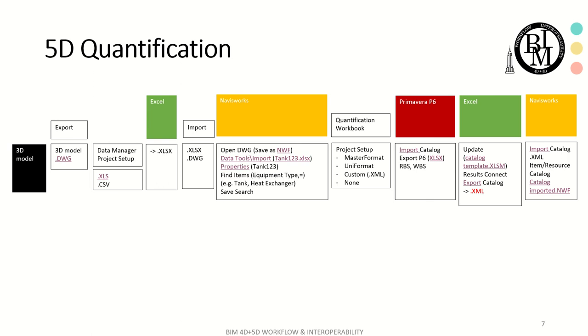One, you already have the list of resources saved in another software, for example, Primavera P6. Then you can easily import that information about the laborers, a list of the contractors, and a list of the materials, for example, concrete or metal, and their schedules and their categories and things like that.